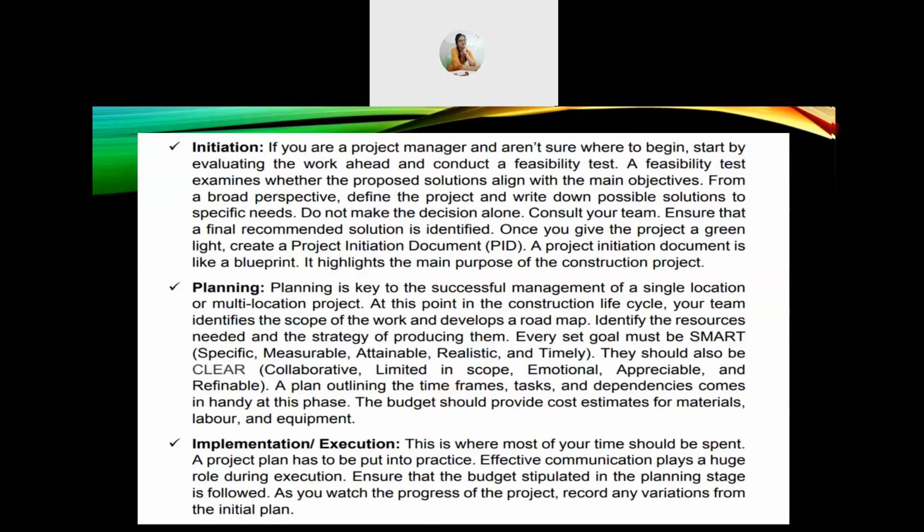Next, initiation. So if you are a project manager and you aren't sure where to begin, you should start by evaluating the work ahead and conducting a feasibility test. So what does the feasibility test do? It examines whether the proposed solutions align with the main objectives. From a broad perspective, it defines the project and writes down the possible solutions to specific needs.